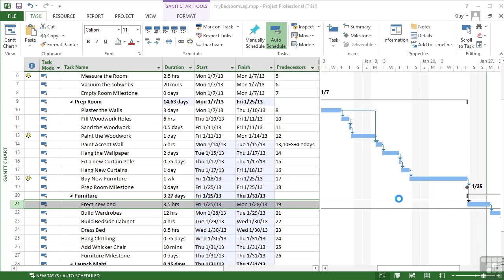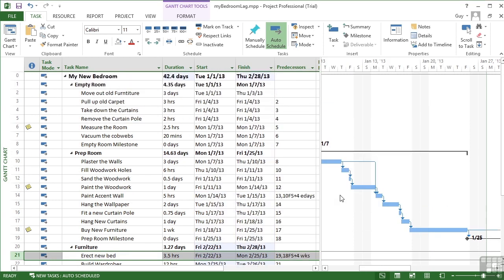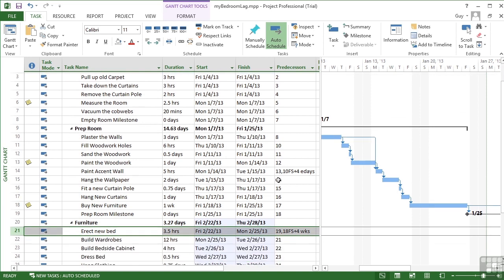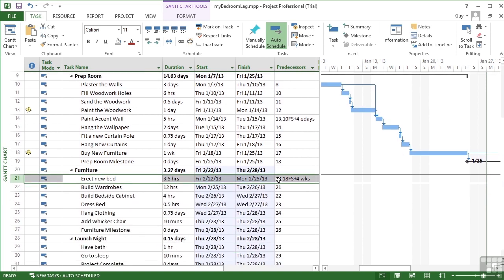Okay, that's going to have one massive effect on the project. And it now doesn't finish until the end of February because we're having to wait for that bed. So part of your project plan might involve trying to get a faster delivery time, trying to make someone make a decision earlier on that bed or sourcing the bed elsewhere.